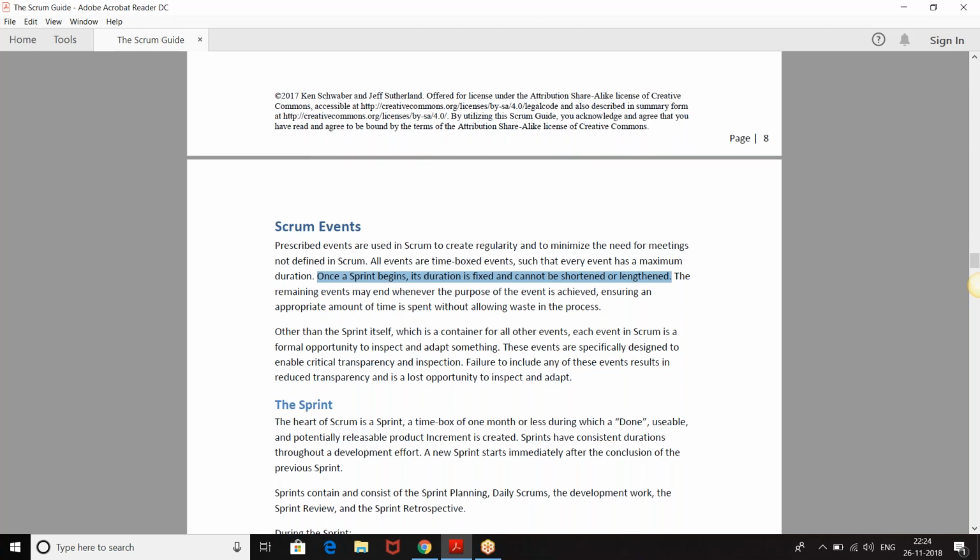Do you need further time for it? You will probably take a smaller number of tasks. Let's say maybe 4 or 5 tasks you took, and none of them you were able to finish. So you will put all of it in the product backlog, and you will say only 2 tasks. Say that you know what, let us finish these 2 tasks for sure. Then if we finish these 2 tasks, probably by the second week or something like that, let us take one more task and do it. Let us not take a lot of tasks and not complete any of them. You understand what I'm saying?